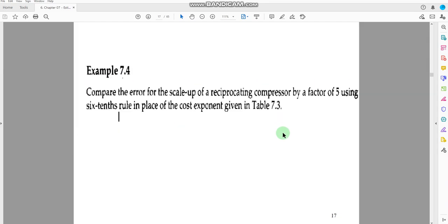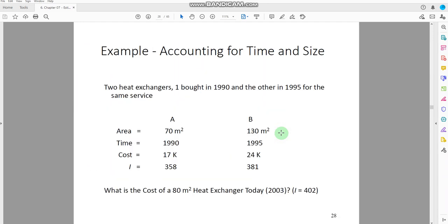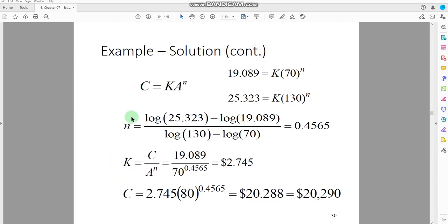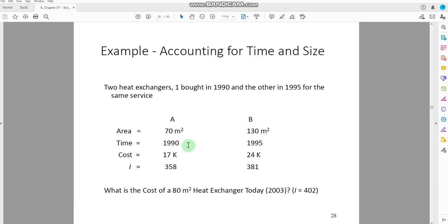Same thing we have to do here. To get the value for the slope, you would see that on the y-axis we are provided with the cost. So you would take the log of the cost that we found here for 1995, then the cost here for the year maybe 1990.